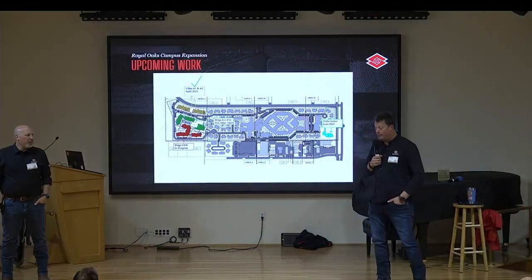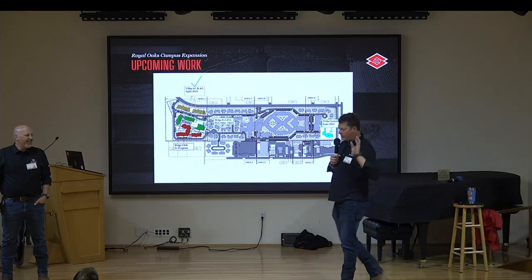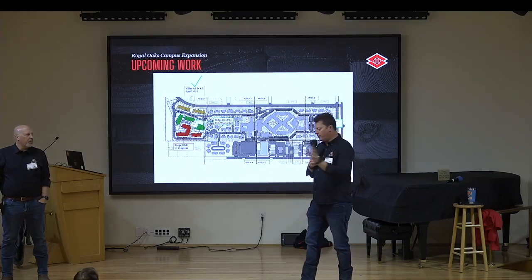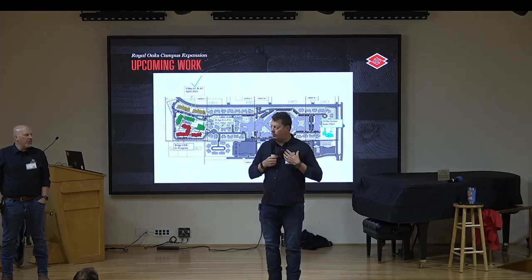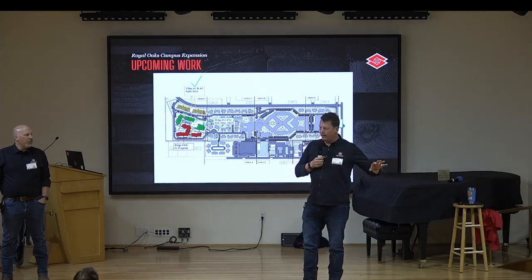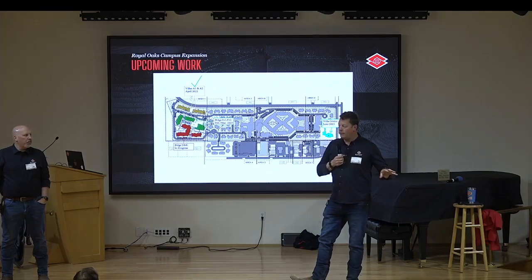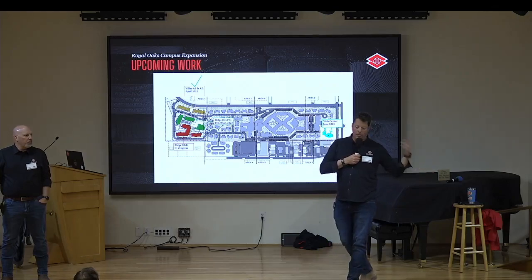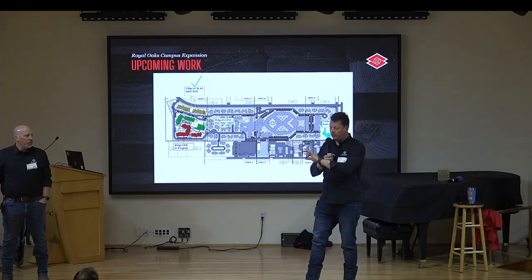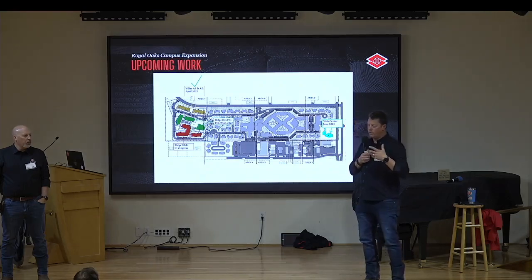It's a great question. Again, I don't know what Royal Oaks has for their staffing and train up and some of the owner items. When we build construction projects like this, there's a bunch of stuff that is our responsibility to build. There's a bunch of stuff that Royal Oaks goes ahead and procures outside of that. That's called furniture, fixtures, and equipment, or FF&E. So I don't know exactly where all that FF&E stuff is, dining tables and things of that sort, so maybe Gretchen can lean on that. But what Sean's getting to is that the building can be used for its intended purpose, so you'll be able to go in and get your mail in March in building G, which is where the mailroom is.